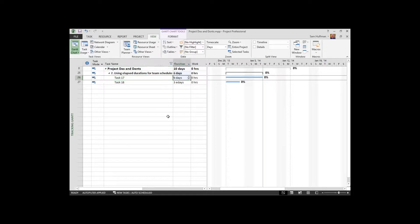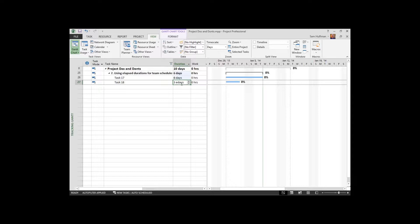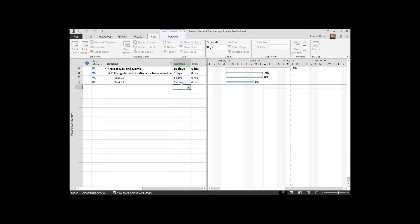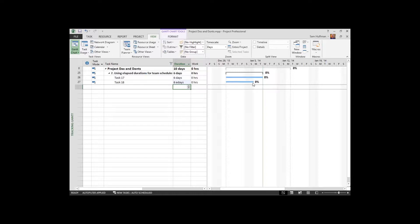But only six of those days are working days. But if I chose six E days, six E D, I get a slightly different bar. This one is exactly six days in duration.